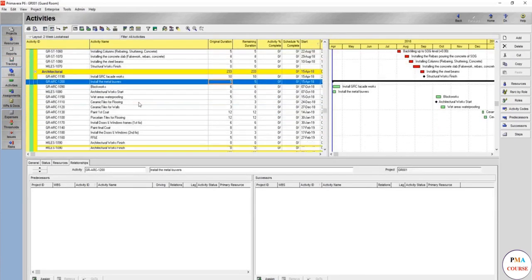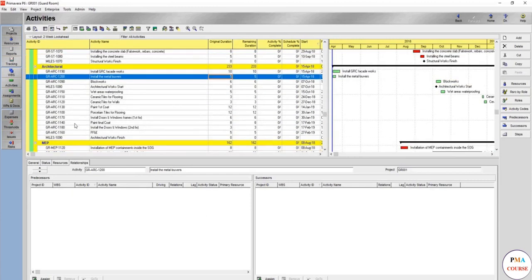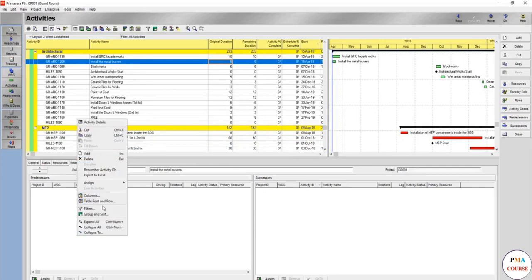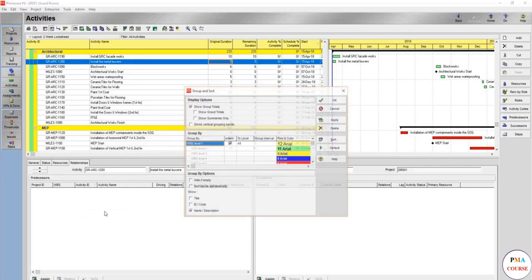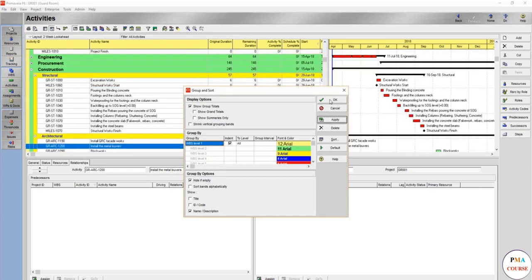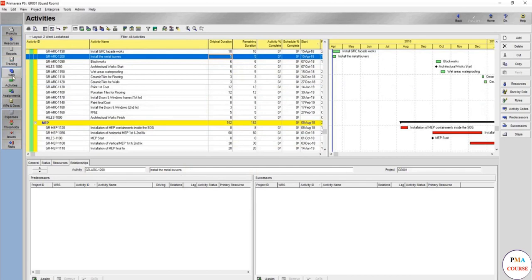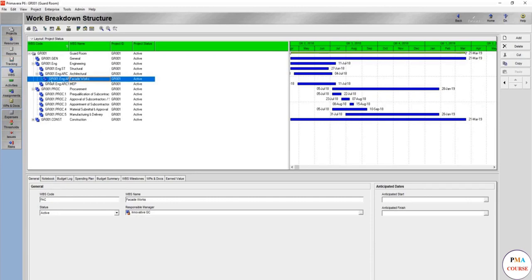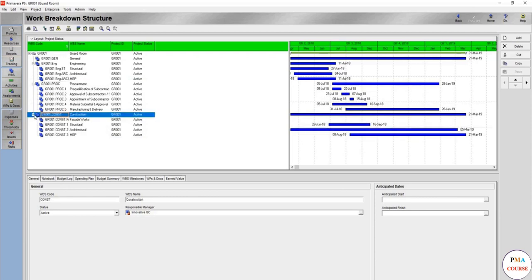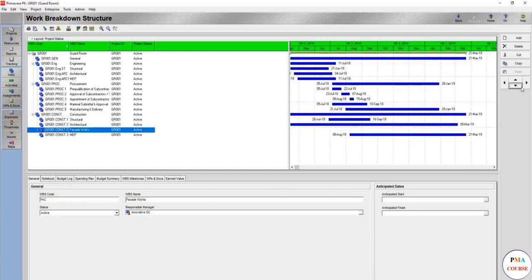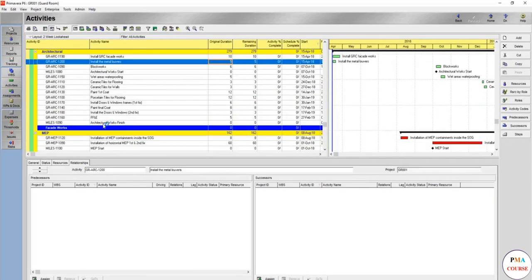Here we have our new activity. Why don't you see the WBS here? We just created it. If you press right click, go to group and insert, it's hide if empty. If you remove it, it should be shown, but it's still not shown. Why? Because it's in the engineering section. You need to move this to the construction architectural section, go down, move it to architecture, and here it is.